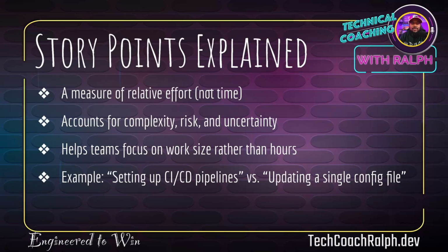So, story pointing, a quick recap, right? Story pointing is not meant to say how much time it's going to take, but it's more about the relative effort. So we're estimating pretty much the level of effort. Is it really, really hard? It's not about whether it takes really, really long, because you can have something that's easy but takes long. Is it hard, is it medium, or is it easy, right? And sometimes it correlates to time, but not necessarily. Something could be very easy, but it takes a long time, or something can be very hard, but it takes a short amount of time, right?